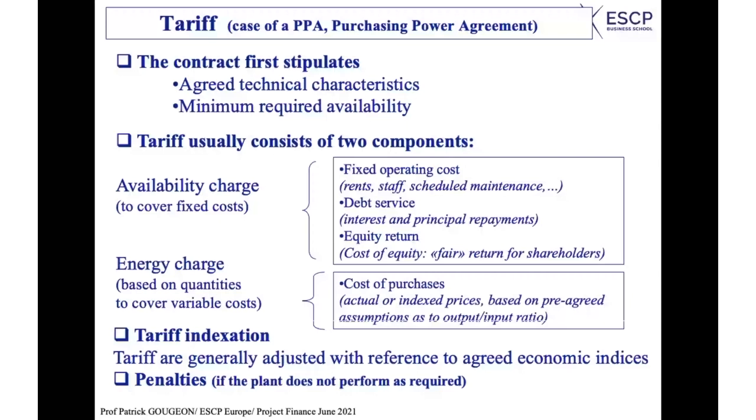Okay, but you see here that you have secured your revenue. Okay, and therefore it will simplify your risk analysis because you know already that revenues are fixed. Then, most of the costs are covered also. Then you may still have a problem of volatility with the cost, but at least the main source of risk, the revenue, is covered with this type of contract.